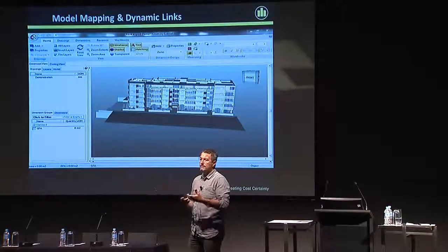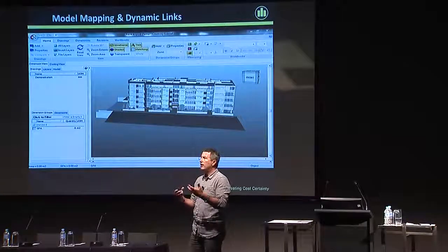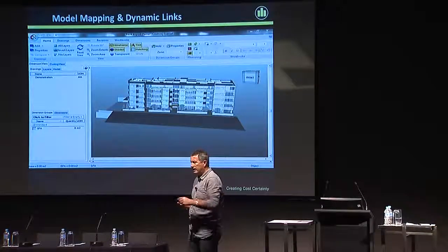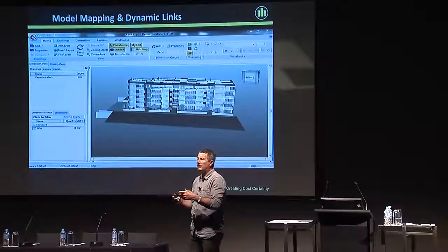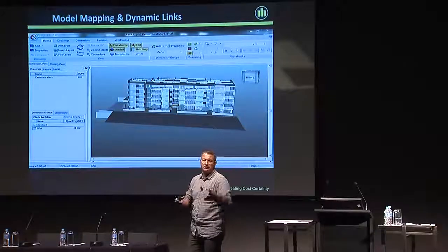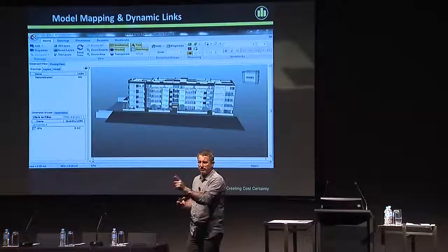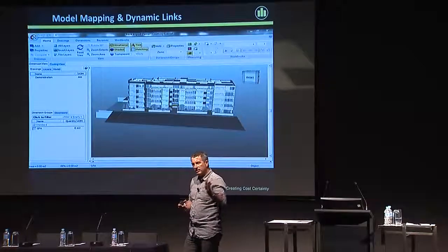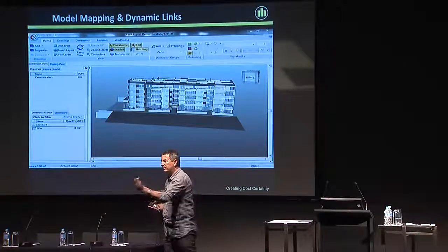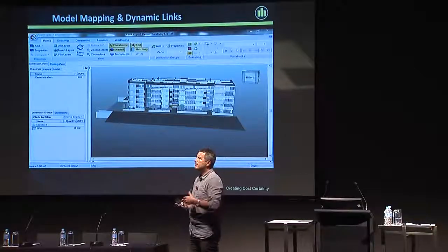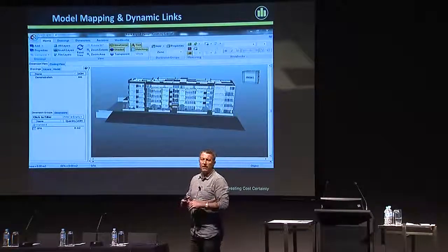Now, when I talk about a map, let me go back. We've heard today about estimates. We've heard about establishing quantities. What a map is like is a search of the database. So it's like a really, really strong Google search to find you precisely the information that you want. And as the design gets more detailed, that map gets more detailed, and we find out more information. By way of example, at the outset, we might want to know what the area of the carpet is.